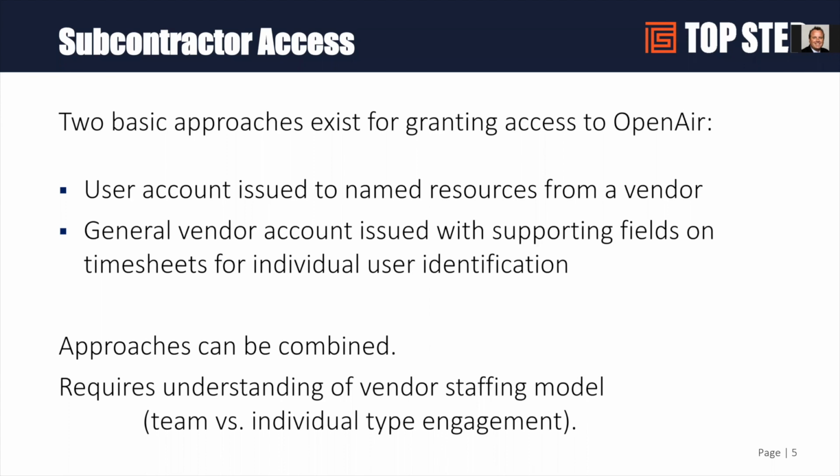The benefit here is it does give you less user count towards your OpenAir licensing. But the downside is you have some limited visibility as to who's on which project and doing the work around task assignments and resourcing, et cetera. So you have to weigh the pros and the cons of choosing whether you want to have a general account or a user account.